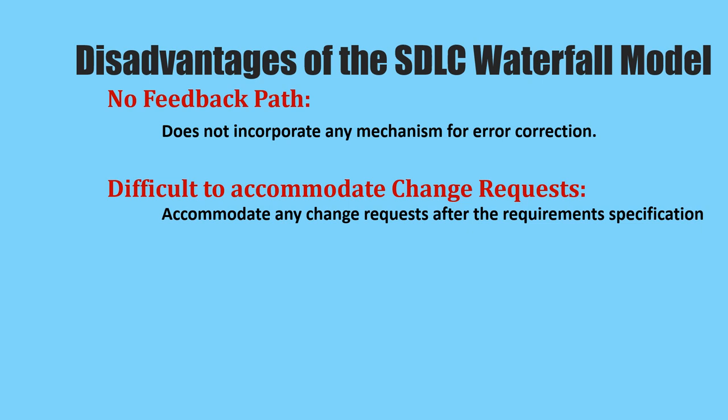Limited flexibility. The waterfall model is a rigid and linear approach to software development, which means that it is not well suited for projects with changing or uncertain requirements. Once a phase has been completed, it is difficult to make changes or go back to a previous phase.